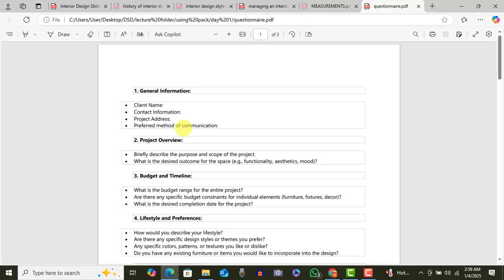Some people prefer emails. My lawyer says you call him, you talk on phone. When you finish, you send him a mail, and then he'll respond to the mail. Do you get it? And he has a reason for doing that. He says everything must have a trail. Even if I have a discussion with you, there must be a trail of our discussion, because verbally, if you are not recording each other, what if you said I said so? If you said no, by email, it's there.